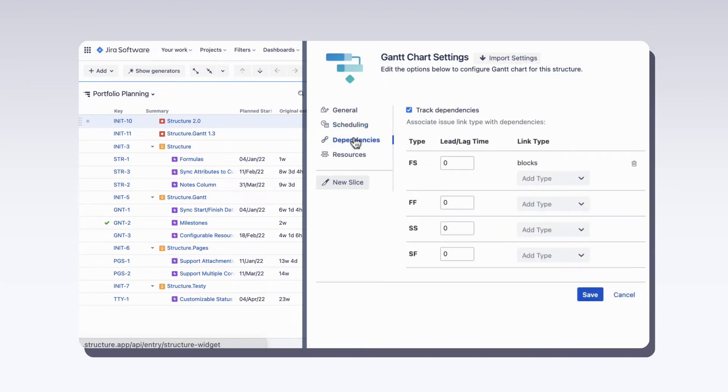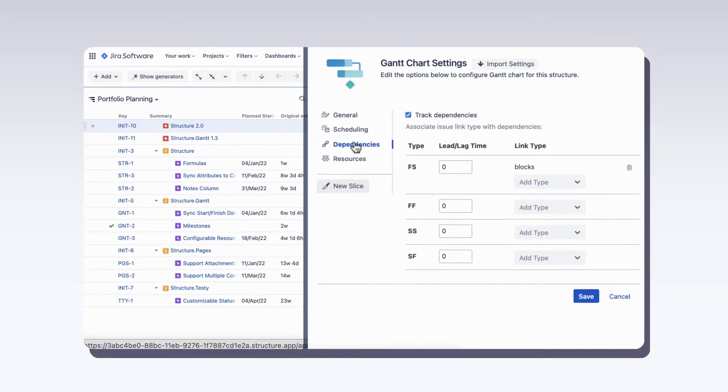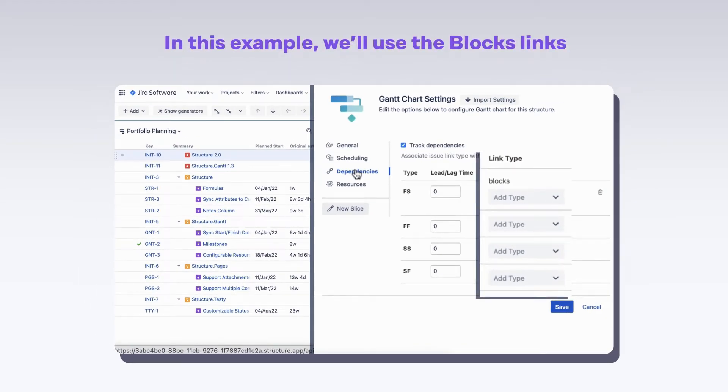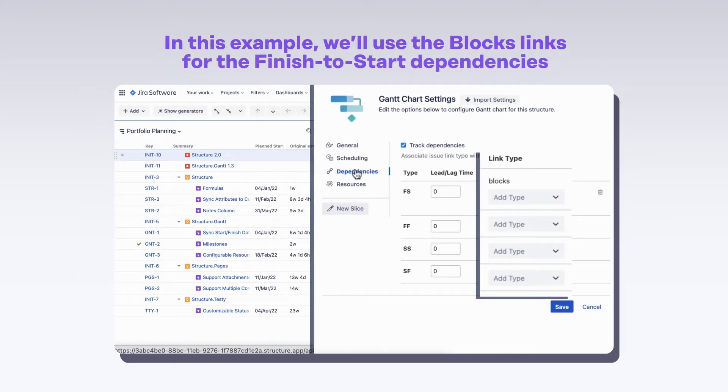For dependencies, our Gantt chart uses JIRA issue links. You can choose which link types will represent different types of dependencies. In this example, we'll use the blocks link for the finish to start dependencies.